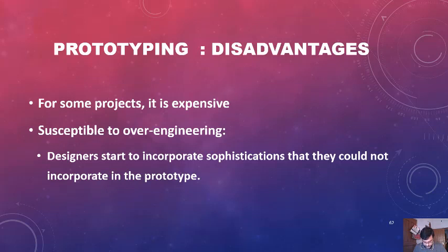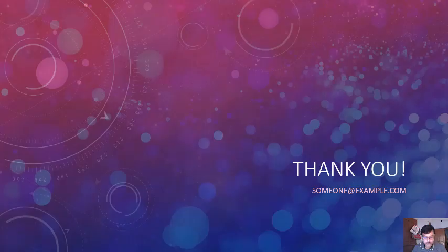But if the requirement is not clear to the developers from the customers, and the requirement is not stable or is frequently changing, in that case, to fix the requirements and to give an idea of the software to the customer, it is better that you use this prototyping model. So this prototyping model builds the prototype first, then after the customer acceptance you throw out the prototype, and then you prepare the actual software following the iterative steps of the waterfall model.